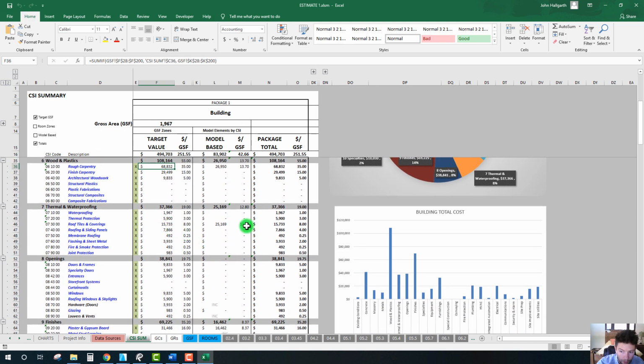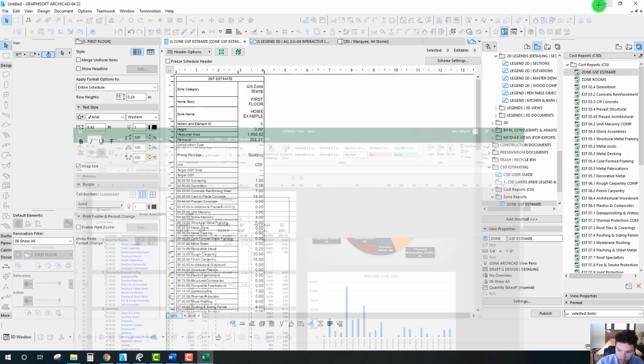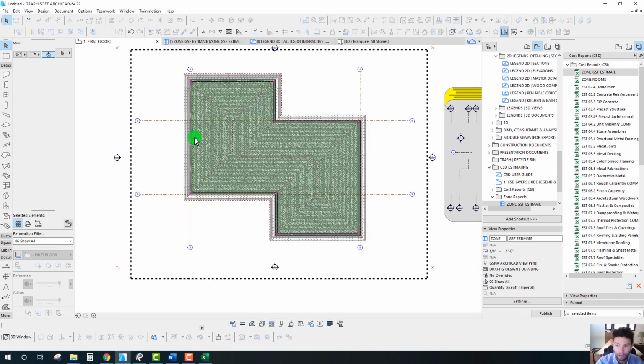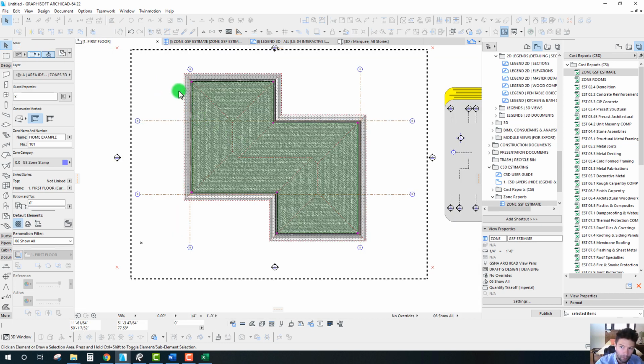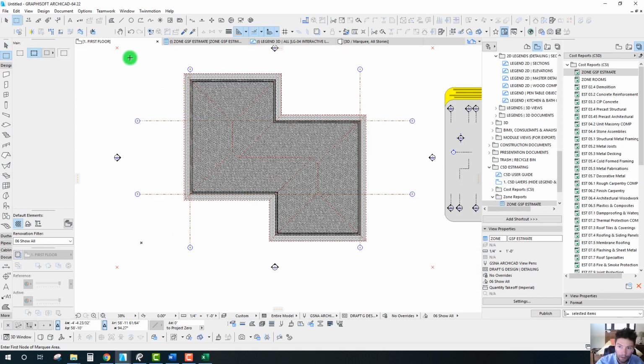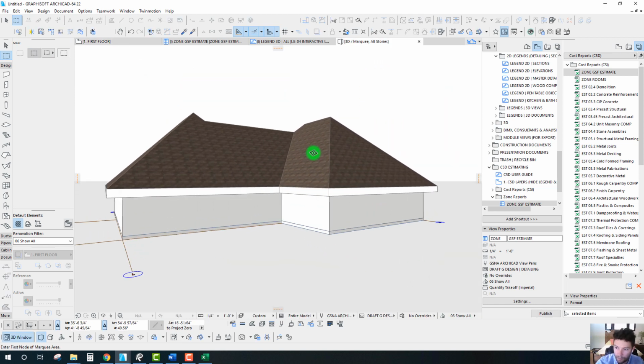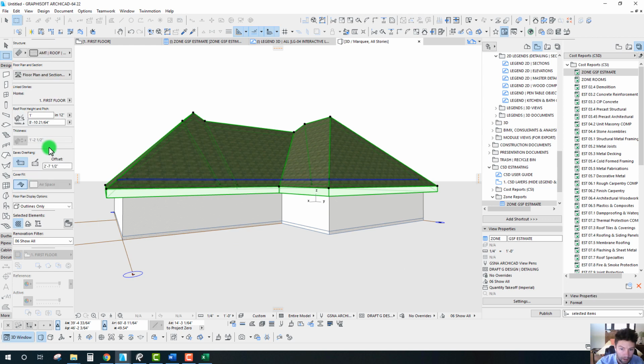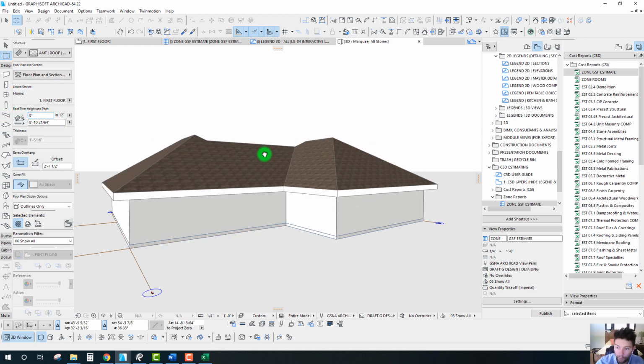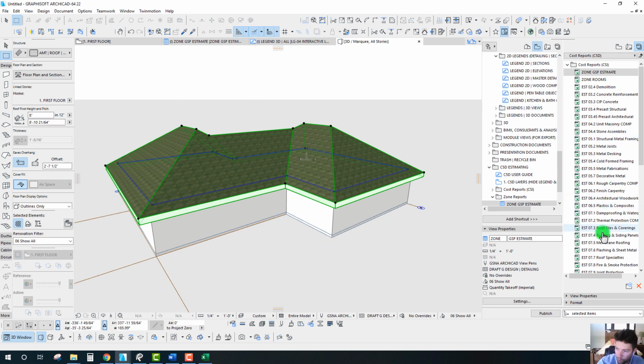Our roof right now, we're at $12.80 per square foot. Maybe that's a little high, and the reason for that is probably because the pitch on this roof for this shape of project is quite large. So let's reduce this down and just see what that impact is. Let's go to 8 inches per foot. We'll flatten that out a bit, and let's just republish roof tiles and coverings.